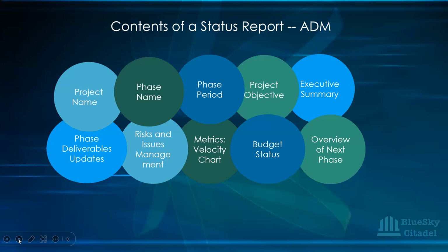And you have the responsibility also of giving them any risk or issue analysis. So your risk and issue management, you're able to bring it in. That there's a foreseen risk of this. What is the mitigating factor that needs to be put in place? Who is the owner of that risk? And what is that person doing towards that risk? What is the timeline to resolve that risk? You should be able to put it there so that the stakeholders are aware. You're not just surprising them when that risk becomes an issue. You've carried them along to say, oh, there is a risk of this that might happen if this and this and this are not done. So they are aware of it.